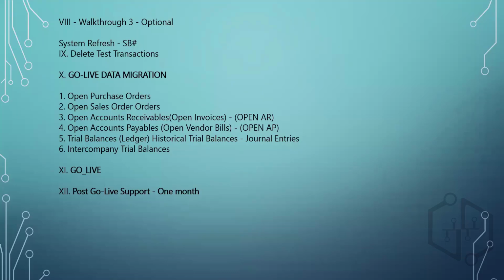But in the SuiteSuccess methodology of NetSuite, what happens is everything is done on production, assuming that this is sandbox. It's okay. Entire master data is imported. All the test transactions, all the test workflows, saved searches, everything are built in production only. And just before you go live, they delete all these test transactions. The master data stays on. Okay, do not get confused. The subsidiaries, the vendors, customers, and everything that I got stays on.